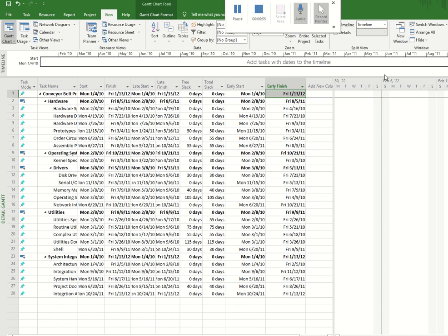Alright, so now don't forget to finish the rest of part 2. We fixed the date for the project beginning on January 4th, 2010. So you need to finish the rest of it. Make sure that you have your holidays in there. Make sure that if a holiday falls on a Saturday, then Friday will be given as an extra day off, and if it falls on a Sunday, then Monday will be given as a day off. And the project team works 8-hour days, Monday through Friday. Then make sure you address the questions in part 2 as well.